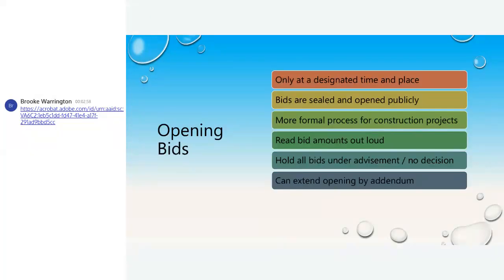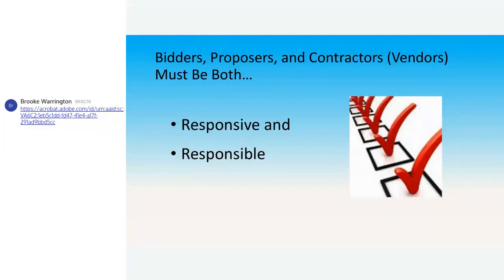Opening those bids happens only at a designated time and place, sealed and open publicly. It's a more formal process for construction projects. You read the bid amounts out loud. You hold all bids under advisement. You give no decision at that bid opening, and you can extend opening by addendum. Remember, always, you have to deem them both responsive and responsible.